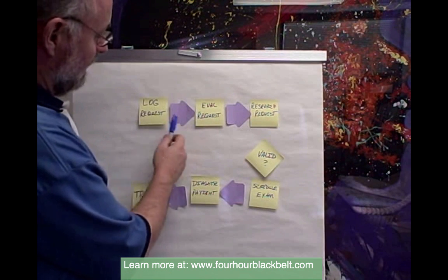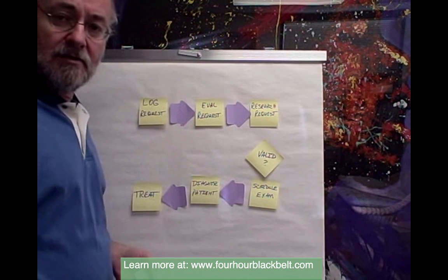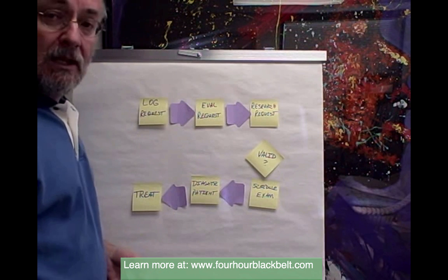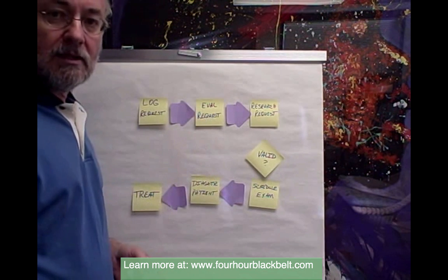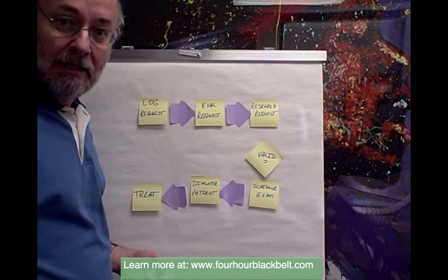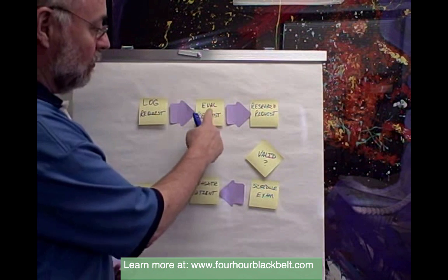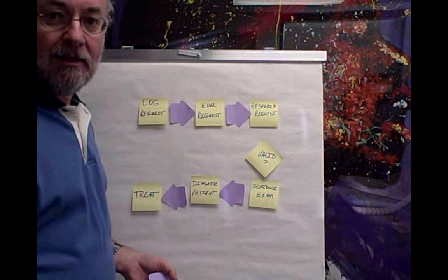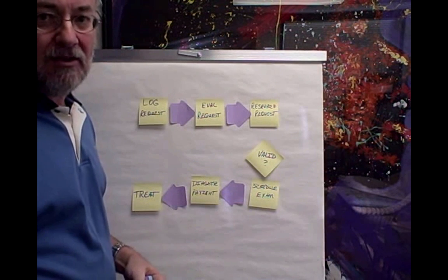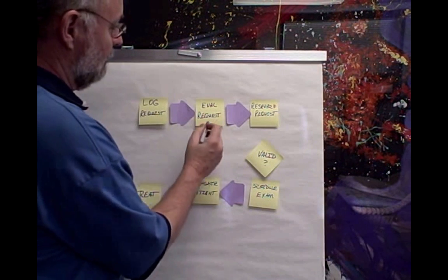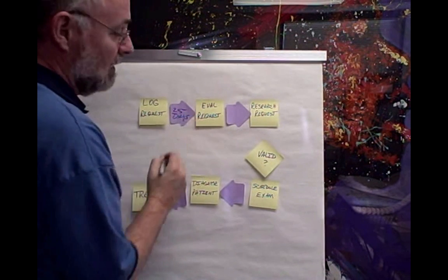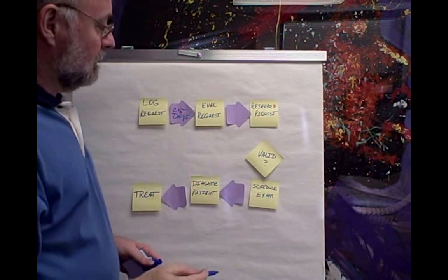So what happened here was I asked them, okay, how long does it take to log the request? And they said, maybe 5 minutes. I said, okay. And then how long does it take to evaluate the request? And they said, 25 days. I said, really? You got one guy, one sheet of paper, working on this for 25 days? And they said, well, no, actually, it's maybe 30, 40 minutes to evaluate the request. And I said, oh, so there's 25 days of delay. They said, yeah. I said, okay, so what happens next?